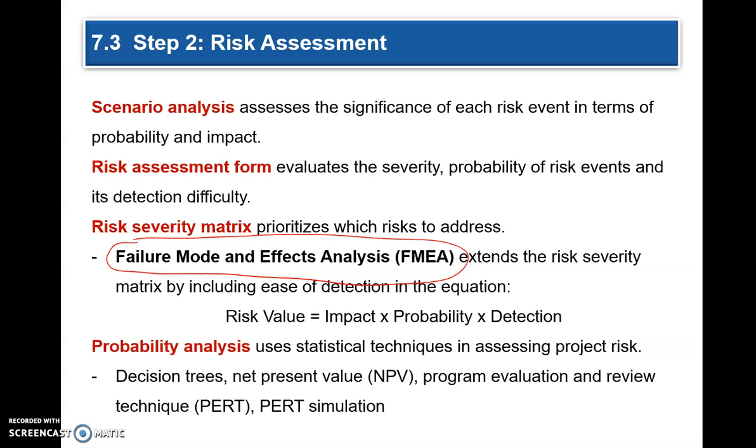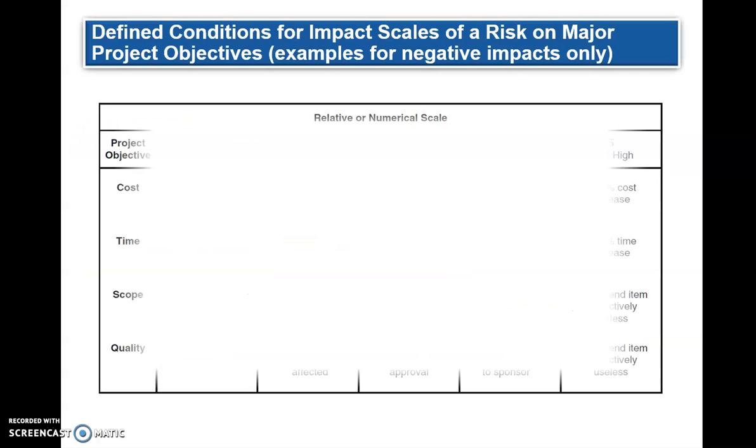In the scenario analysis, you assess the significance of each risk in terms of probability and impact. And it is pretty much the same as the failure mode analysis. Here you'd have one more factor, which is the detection. Okay, let's talk about these various types of risk assessment.